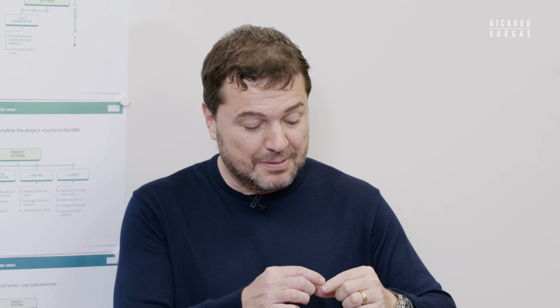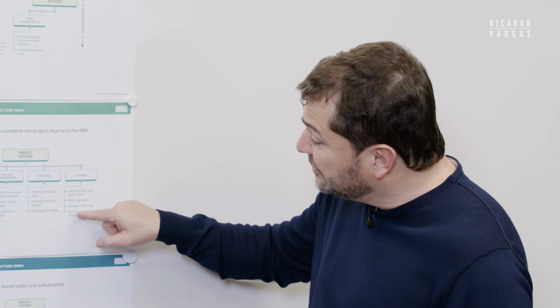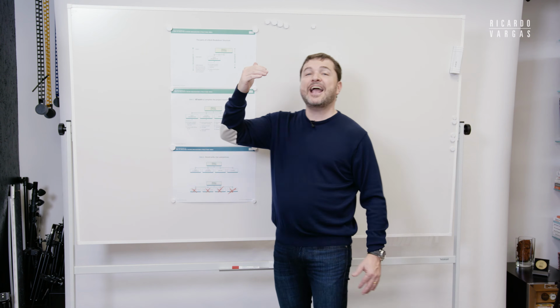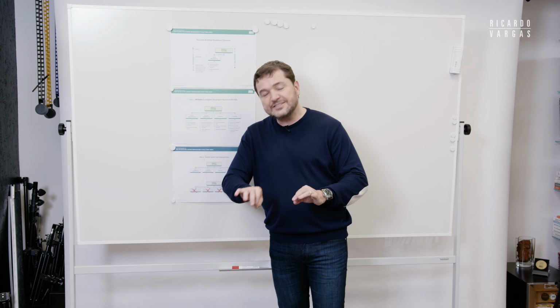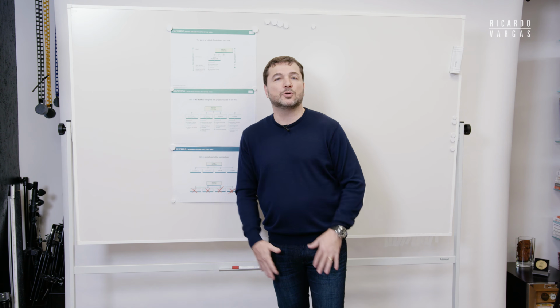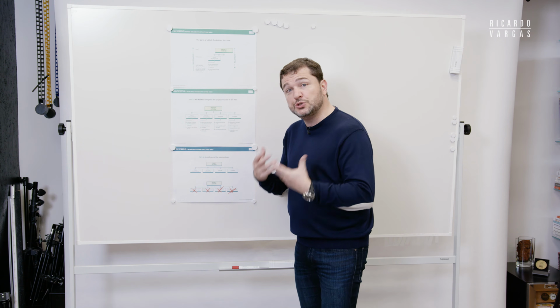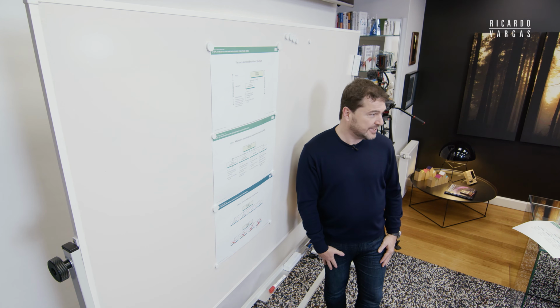So I put all caps in all elements that build the WBS chart, and on top of every single work package, I then have a task list. And the task list will be the lowest level of my Microsoft Project schedule. Please, you don't need to follow this. I'm just using this as a best practice for me in all the projects I do.